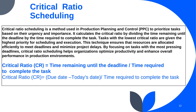Critical ratio scheduling in PPC is a method used to prioritize tasks based on their urgency and importance in relation to project deadlines. It calculates the critical ratio by dividing the time remaining until the deadline by the time required to complete the task. Tasks with lower critical ratios are given higher priority for scheduling and execution, ensuring that resources are allocated efficiently to meet deadlines and minimize project delays. Critical ratio scheduling helps managers focus on tasks most critical to the project's success, allowing for better utilization of resources and improved overall project performance. By incorporating critical ratio scheduling into PPC strategies, organizations can enhance productivity, streamline workflows, and achieve timely project delivery.